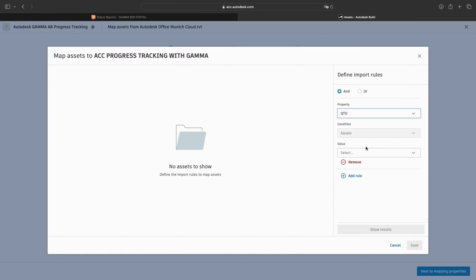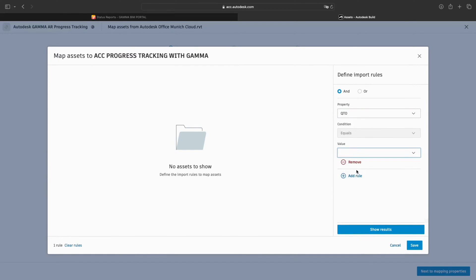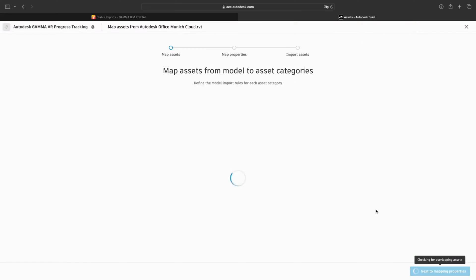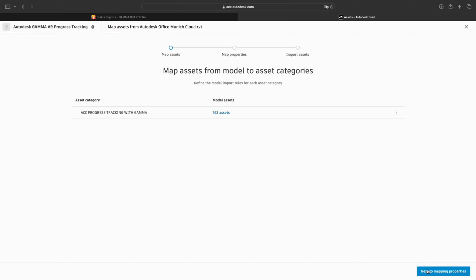In our example, we create a property called QTO, which all the objects we want to track have. We use this property now to import all elements in our project.